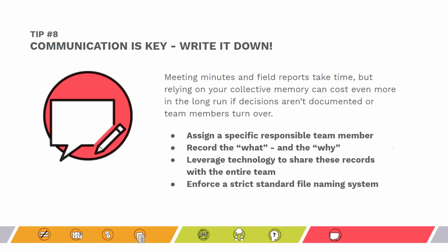throughout the project. It's important to record not only what was decided, but why you all agreed on that course of action. The what is obviously important now as you're executing things, but the why will be important if you need to revisit or reconsider decisions. You don't have to go back and hash these conversations out all over again.